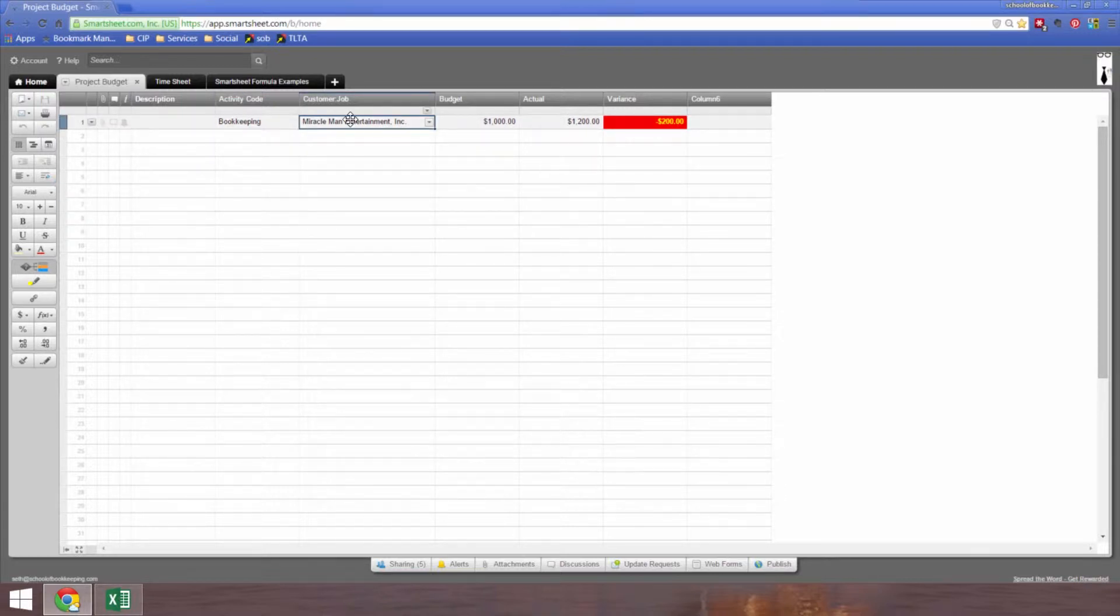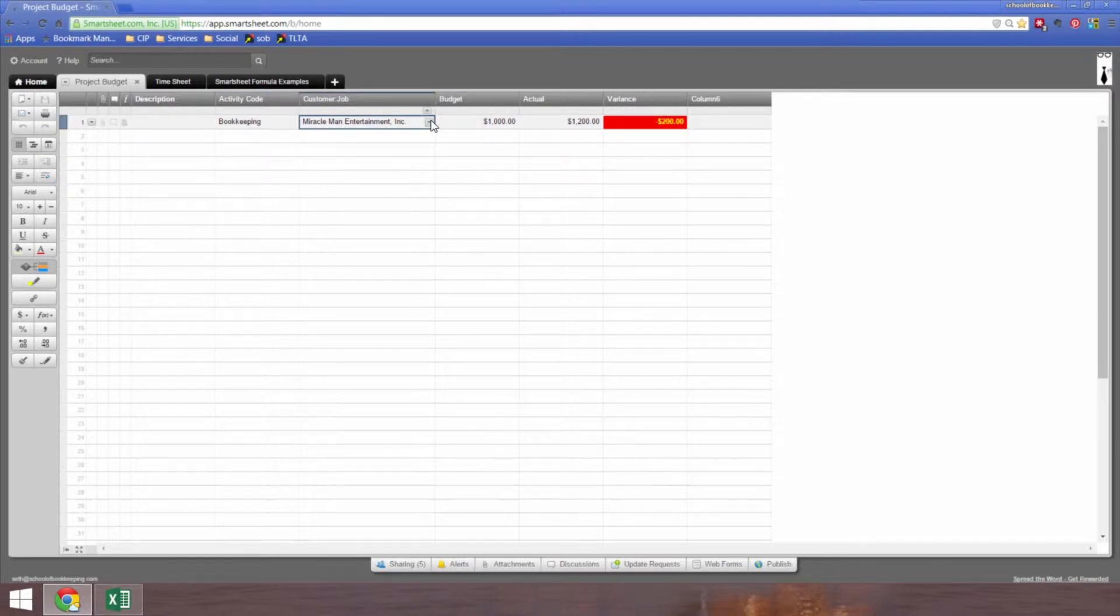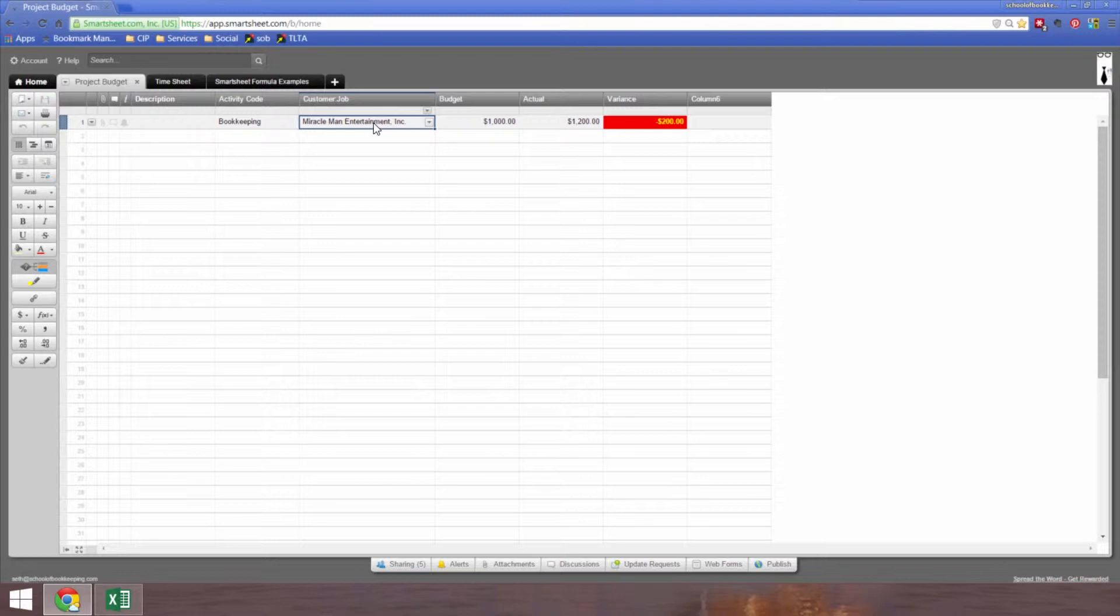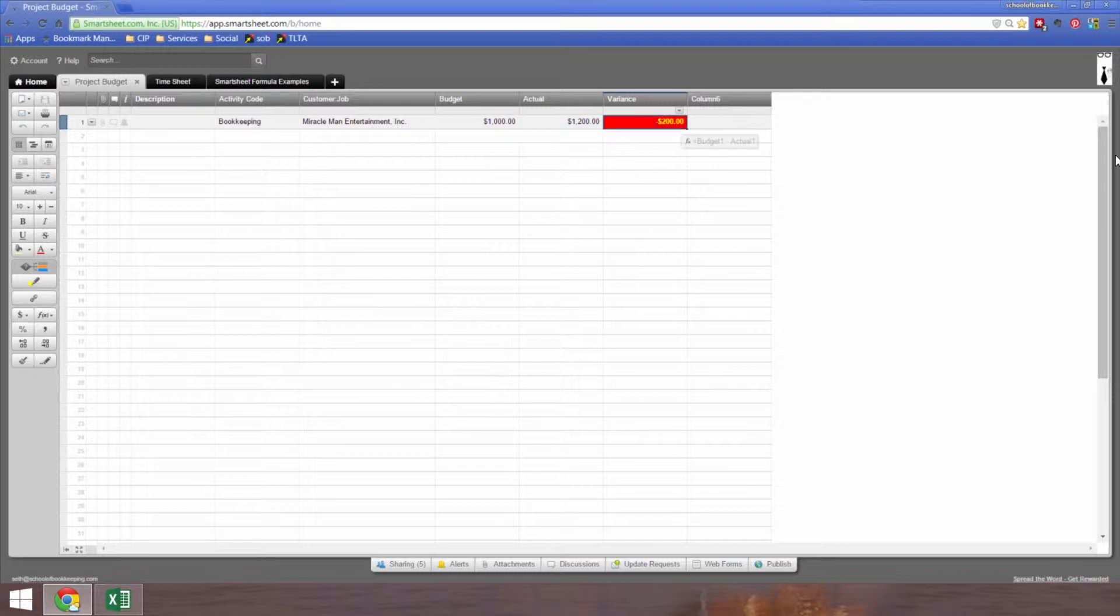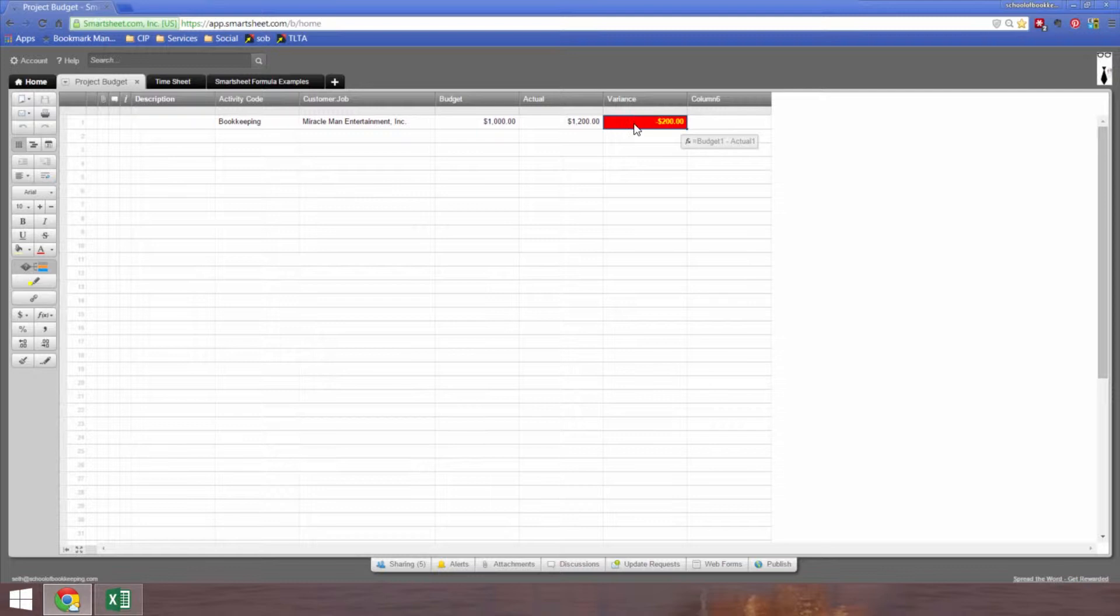For purposes of budgeting, that's useful to do. Then I pick from my customer job list. I've got Miracle Man Entertainment as a client. Notice I have a budget amount of a thousand and an actual amount of twelve hundred. I used conditional formatting so that when the variance is less than zero, it lights up in red and yellow.